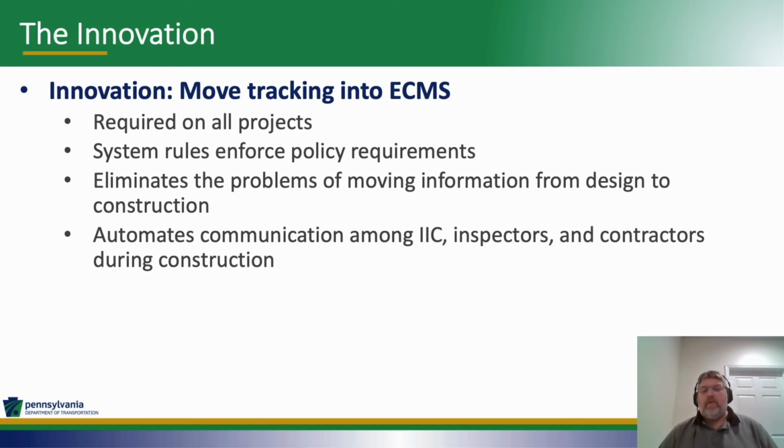And then the really innovative part of this was to move the tracking into ECMS. A lot of what we do with mitigation is try to get it into the contract documents, so we're updating special provisions, we're putting notes on plans, we're putting drawings on plans, and now we have this additional checklist of mitigation activities that need to happen. So moving all of that into ECMS puts it in a system that has rules and validation and roles and responsibilities that are well defined.